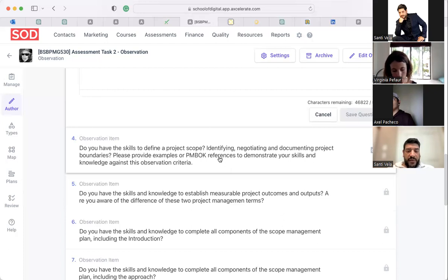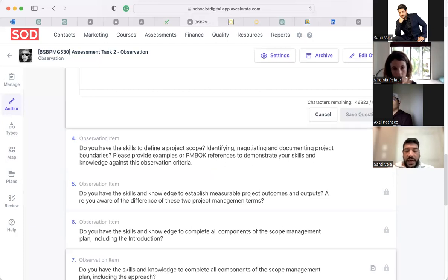the project scope established, well, I'm going to ask you this. Once we have the project scope established, can we change the project scope? Yes or no? Yes, we could. We shouldn't. We shouldn't, but we could, correct. What is the official form, or the official document that we have to use to change it? The change request? Well done.